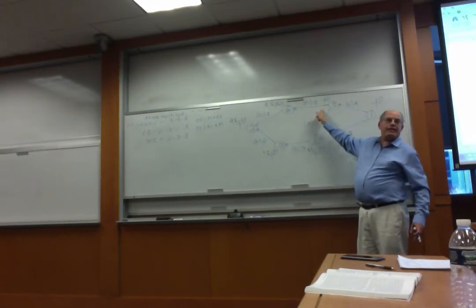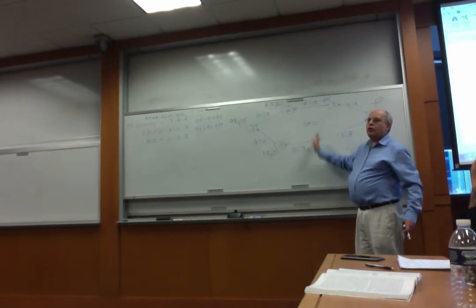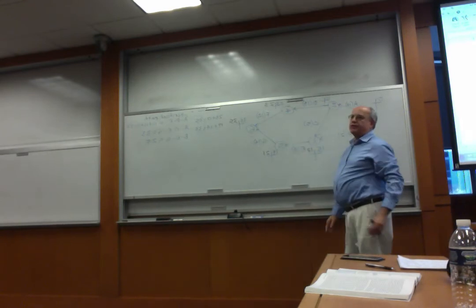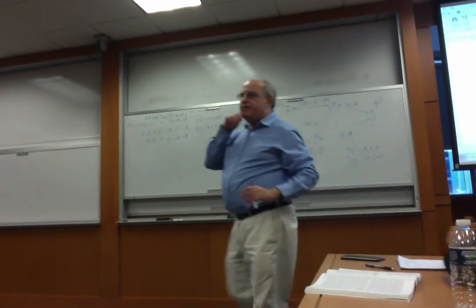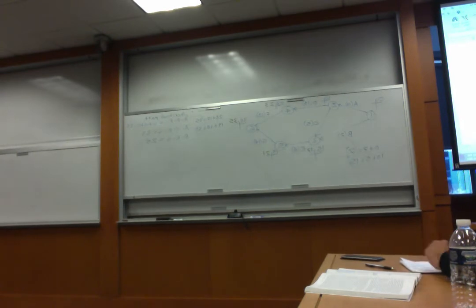The next one is where I need everybody's attention. Can we get to 2 going backwards? Look at the first time. There are 2 ways to get to 2 going backwards, from 3 and from 4. Yes, but there is more than one way. So now, since everything is done in reverse, I'm going to try both ways and select the smaller value. Remember, when we went forward, it was the larger value.